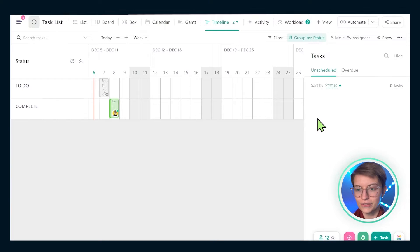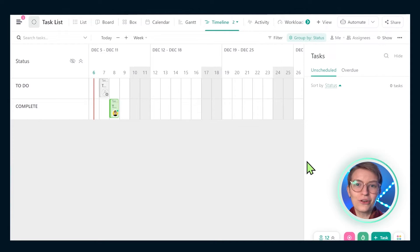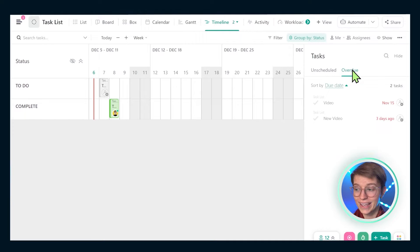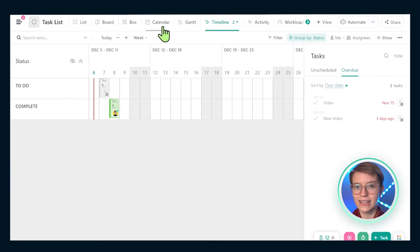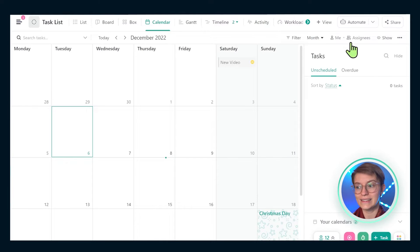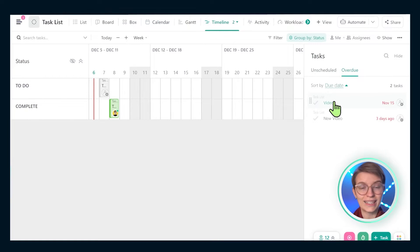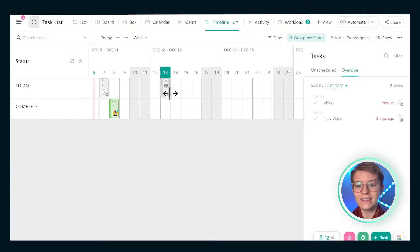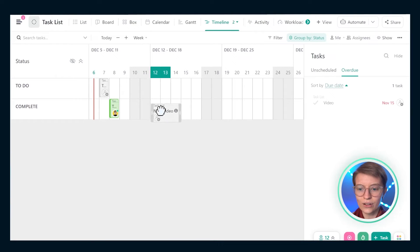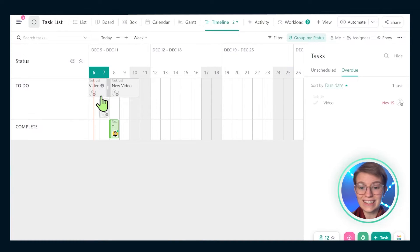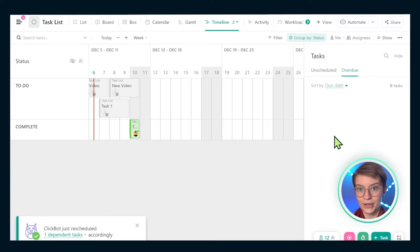To the far right of our timeline view, we've got a tasks sidebar that shows us all of our unscheduled or overdue tasks in one central place. It's the exact same layout and structure you're used to seeing inside calendar view in ClickUp. The reason this sidebar is really handy is if you're looking to schedule out a project, work shifts, or an engagement with clients — this allows you to play a bit of scheduling Tetris, clicking and dragging your assignments onto your calendar from this sidebar without having to go find them elsewhere in ClickUp first.